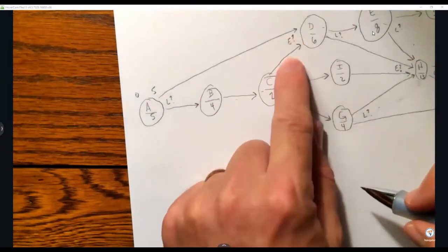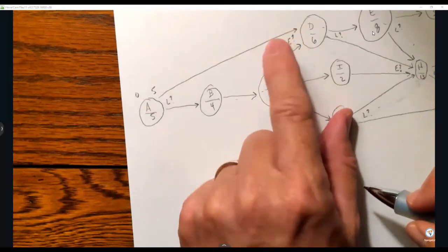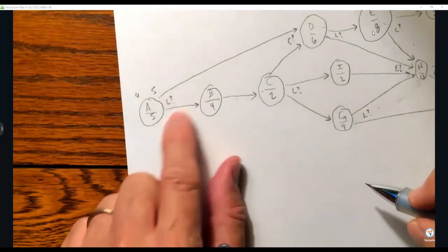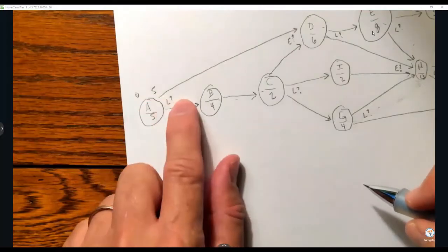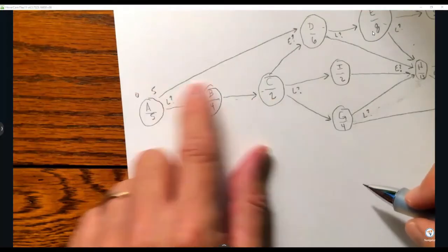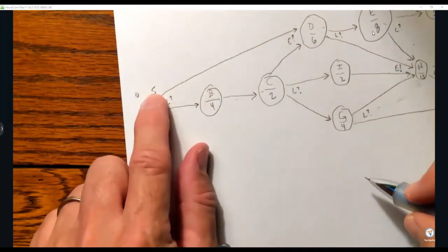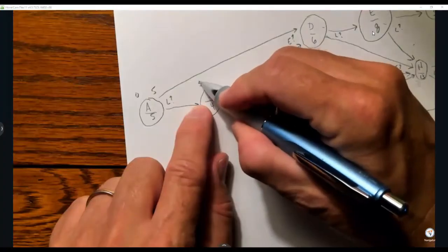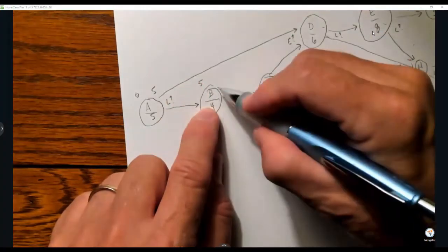And I have to make a decision here, so I have to wait. I can't put 5 there. I have to wait and see what happens. This one, I don't have to wait. So this one's 5. I'm looking at just the E question marks here. 5 is the earliest second finish. The earliest second start there is therefore 5 days later. 5 plus 4 is 9.